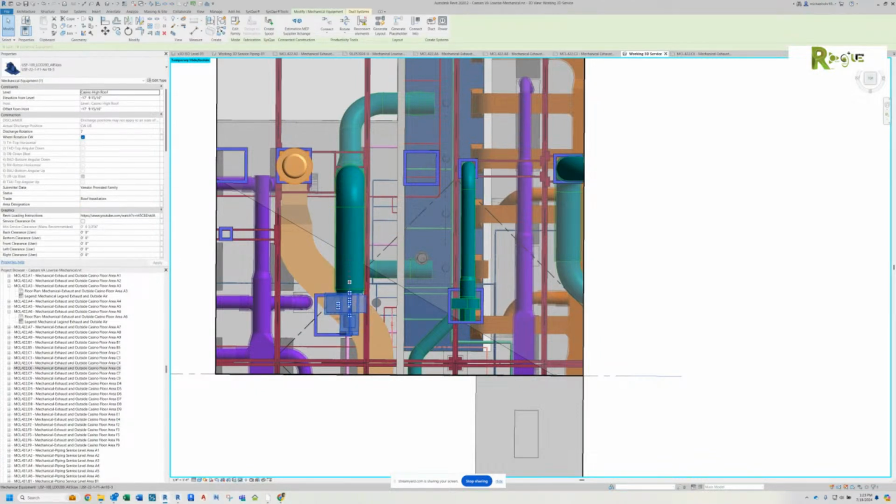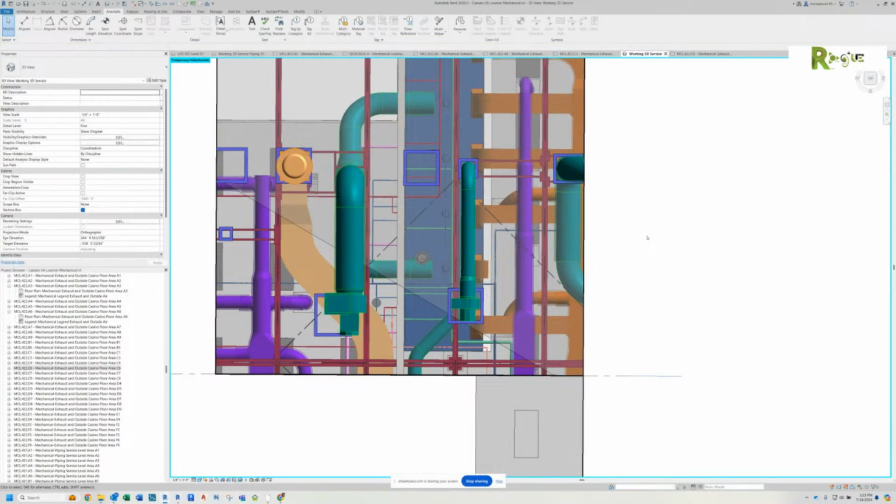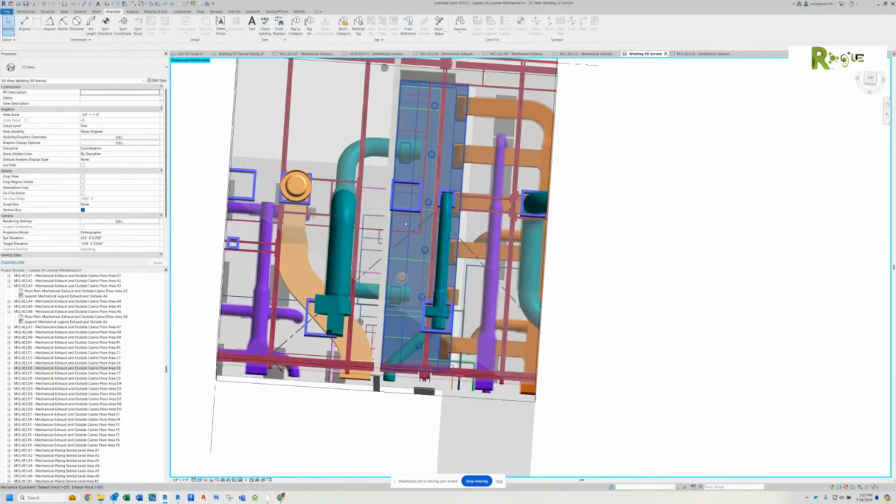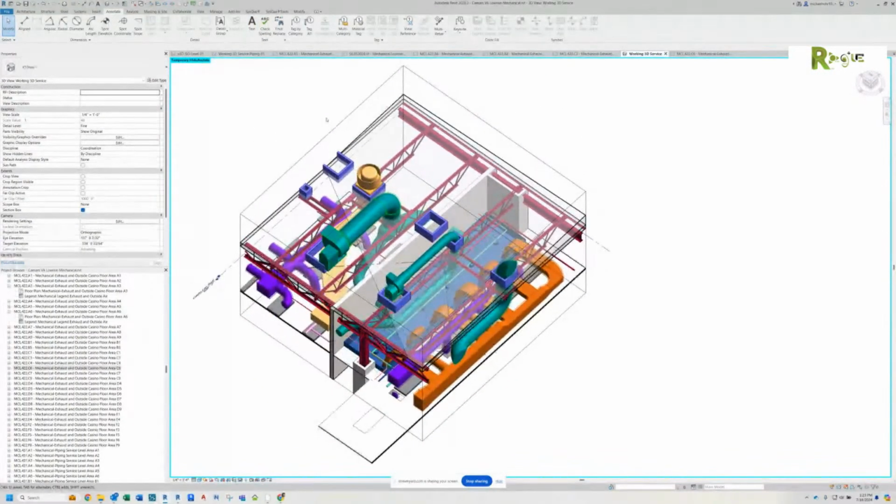Are you leaving the fan where it is? No. That fan's going to go up there closer to that. Only thing we've got to double check is that we don't have anything taking in fresh air within it. You don't have any air handlers within that, so you should be fine. Gotcha. Okie dokie. We'll make that change in the model. What do you want me to do when I talk to Vortex? Do you want me to tell them that one's changing, or just let the parts come? Like I said, all it's going to do is you'll end up with a couple extra pieces that you'll throw in the dumpster. Yeah, just leave it like it is. If we need something else made, we can do that down the road.